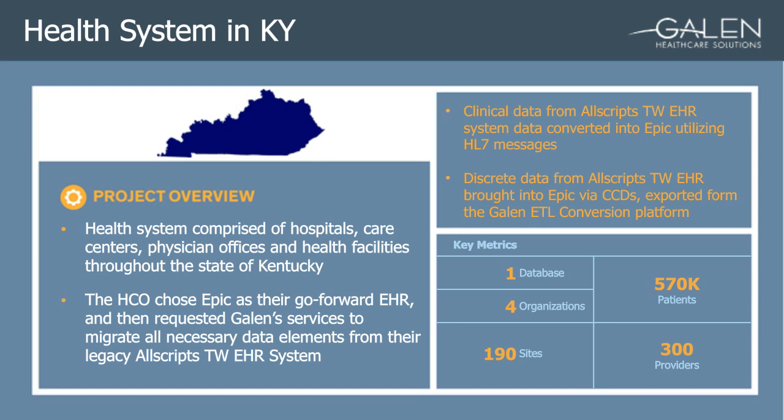So with that organization, I worked most recently there as an Epic program manager. And during their Epic implementation, I was responsible for their patient load, electronic clinical data conversion, as well as the change management program. So they did choose Epic as its new system. And the scope of work for it included 7 hospitals and all owned ambulatory entities. The implementation was really designed as a rollout across the markets, with essentially ambulatory going live a few months ahead of the hospitals within that particular market.